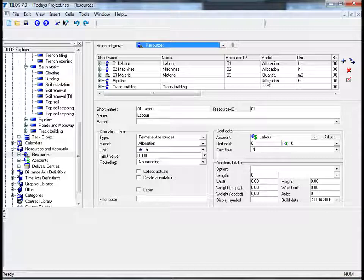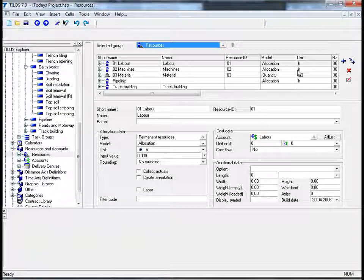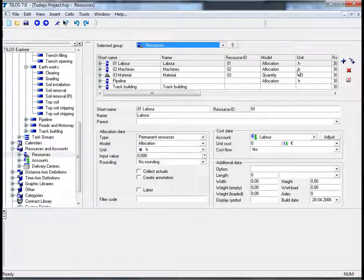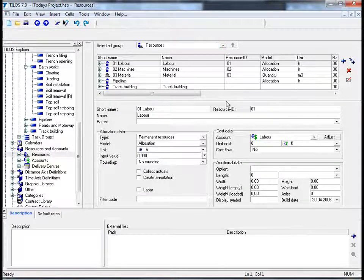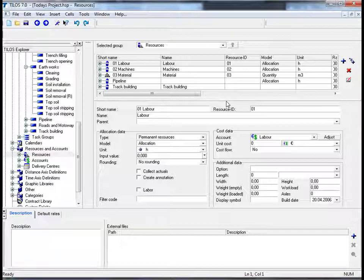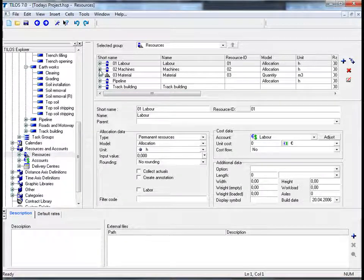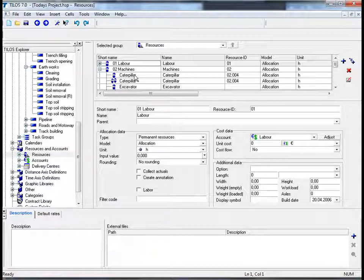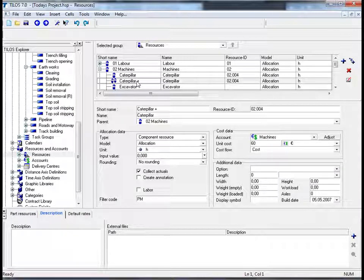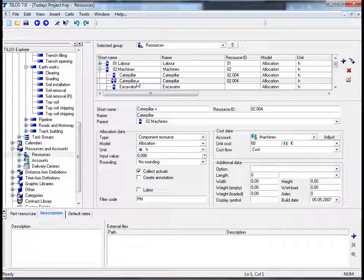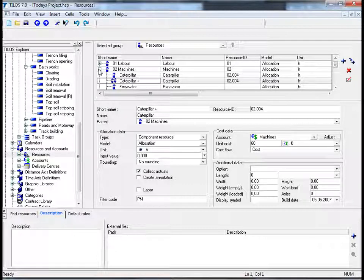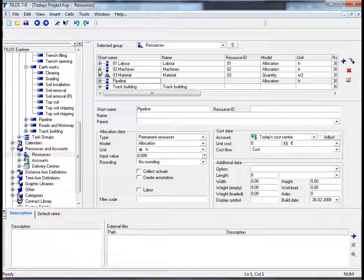Tylos can calculate what resources are required across a total project as long as these jobs and resources move from one job to another inside the actual project. Tylos is also capable of taking complex resources into consideration, a mixture of resources. If we click on the plus symbol next to machines, we can see that we have a number of tasks which also include operators. Tylos takes equipment and an operator but also things like gasoline and diesel into consideration too.